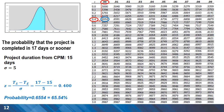The project duration from the Critical Path Method is 15 days, and we have a standard deviation given to us. The objective is to understand the probability of finishing the project in 17 days or sooner. We calculate the z-score — in this case 0.4 — and the probability associated with finishing the project in 17 days is 65.54%. Because 17 days is longer than the mean of 15 days, we have a greater probability than 50%.